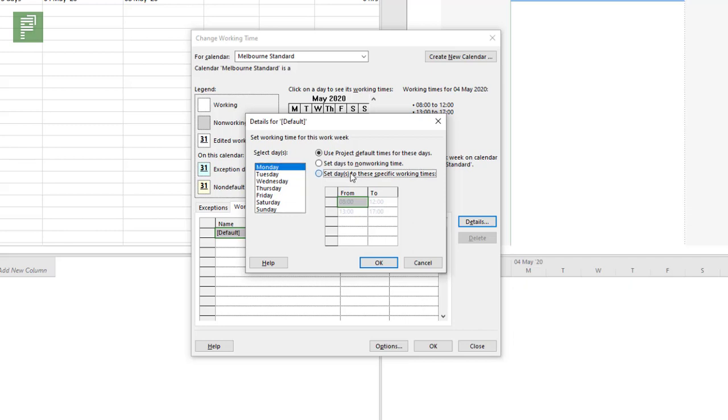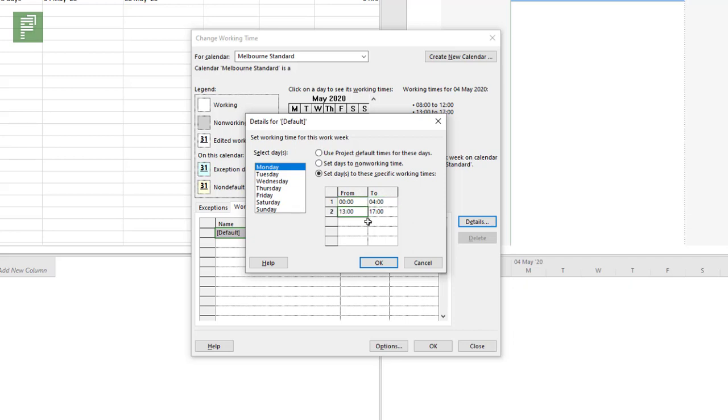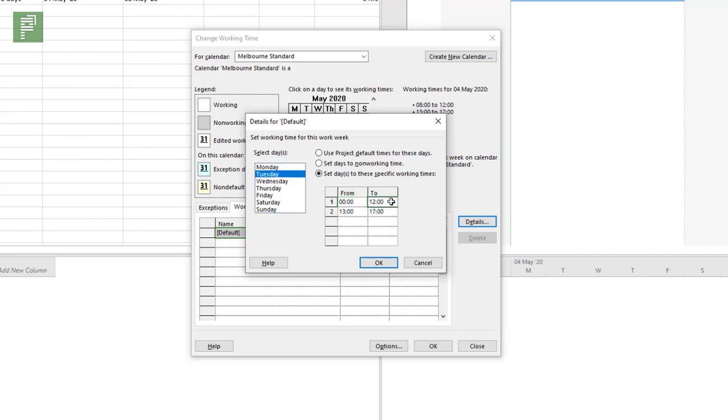From Monday till Friday, I want to set them to specific working times. For Melbourne, we actually start at midnight my time zone and we work for four hours, then we get a break for an hour. So this is going to be zero to five, and we're going to work until nine o'clock in the morning.